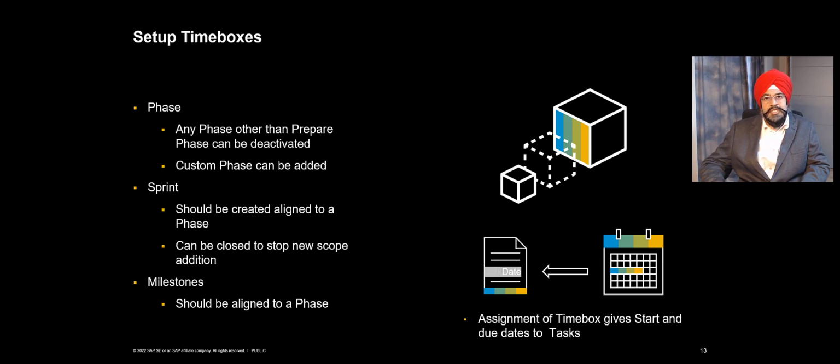You can also create sprints as optional, and in case you do, we highly recommend that you align your sprints to the timelines of a phase. You can also create milestones, and again, it will be very good if you can align your milestone definitions to a phase and then later use them for a specific purpose.